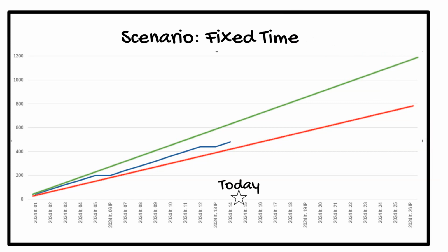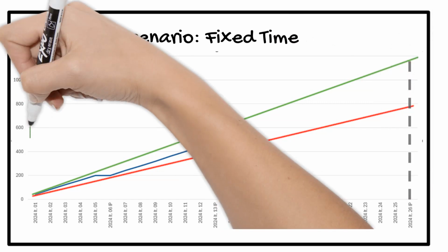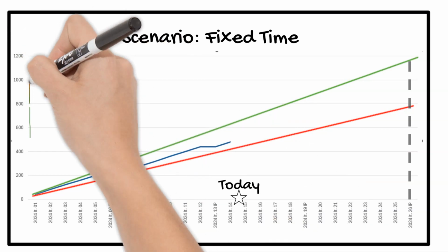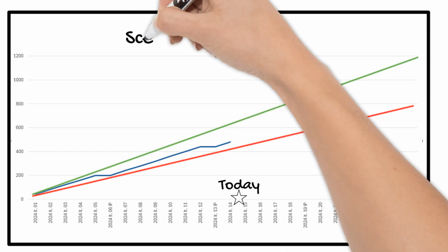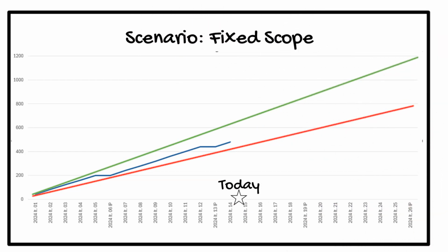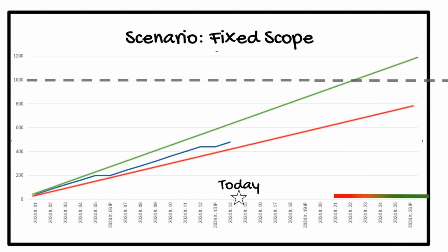Let's assume we have a stakeholder asking, what will we have by the end of the year? The product owner can honestly say, we will have some of these done, maybe some of these, and none of those. Another stakeholder asks us, when will I have this feature? The product owner can state, we'll have it done sometime between end of November and early January.